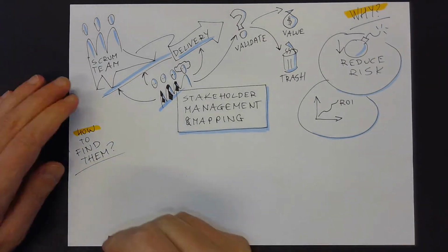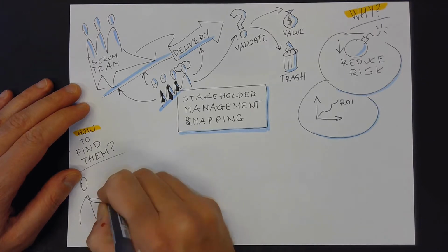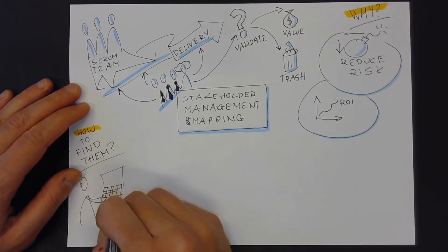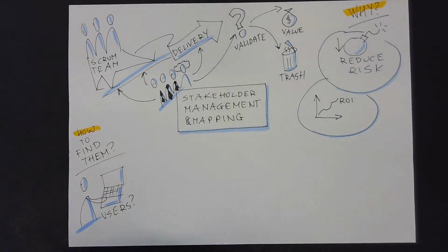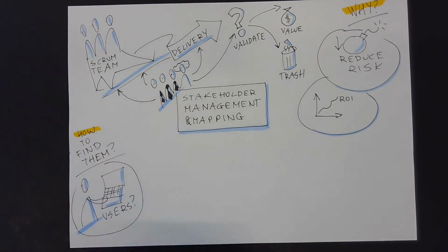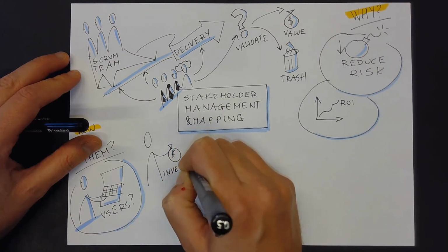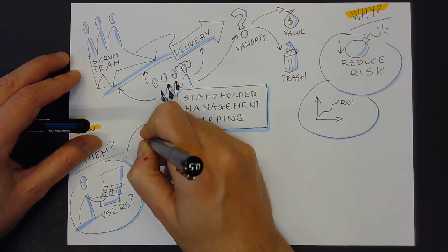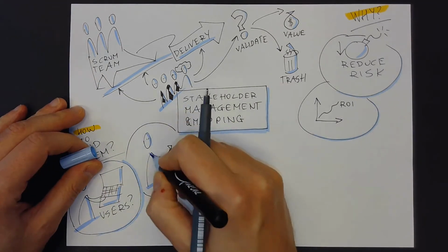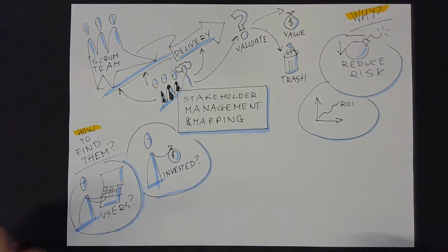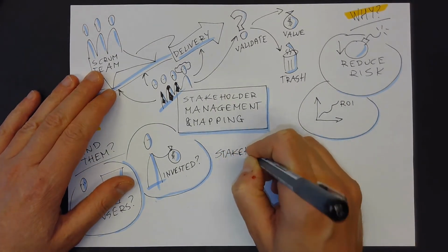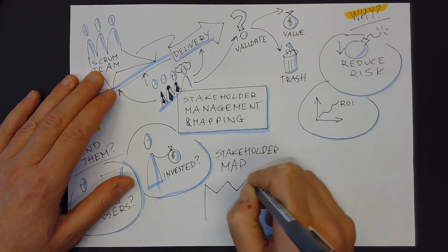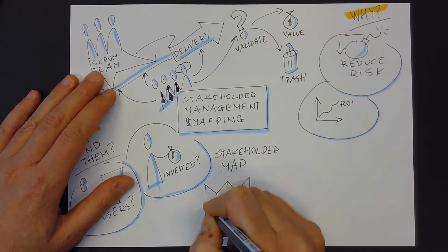The following questions can help to discover if they have a meaningful stake. Are they going to use or are they using the product on a regular basis? Are they investing significantly in the development of the product? Are they personally invested in solving a challenge that your product addresses? In short, a stakeholder is someone who helps you decide what is valuable to work on next because it's important to them to get a return on their investment of time and or money. Having this in mind, you can start to identify your stakeholders.